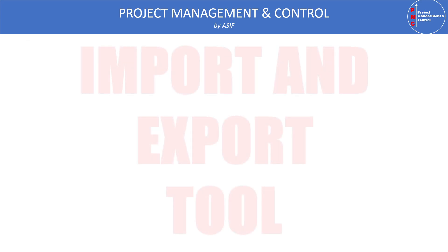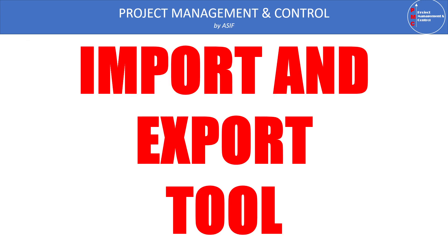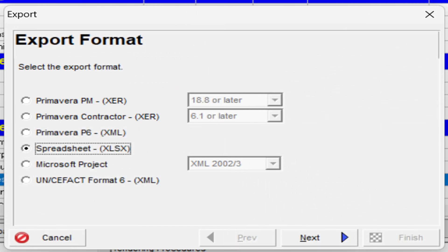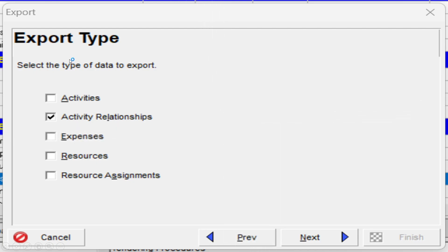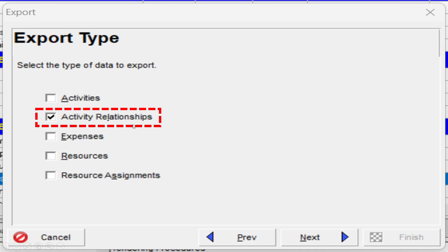Let's see how we can create the report using the Import and Export tool in Primavera P6. When you go to File and select the Export button, the export dialog box will appear. Here we can select Spreadsheet — you have several options including Primavera file and XER file format. We select the fourth option, which is Spreadsheet, and then click Next. The export options will appear: Activities, Activity Relationship, Expense, Resource, and Resource Assignment. Here we select Activity Relationship and press Next.